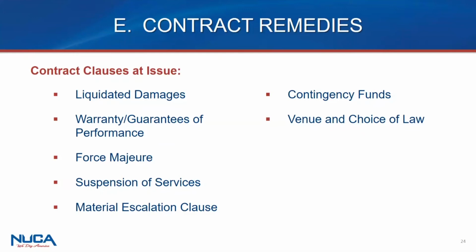So if I have a contractor that works in Pennsylvania and New York, I can say the law of Pennsylvania is going to apply even if the project's in New York. And I do that at times when there are concerns of my client over certain provisions, and I know Pennsylvania has better law than New York. So that's something to think about. You've got to have in there an ability to pick the right choice of law, which means your team has to include somebody who can guide you on that.